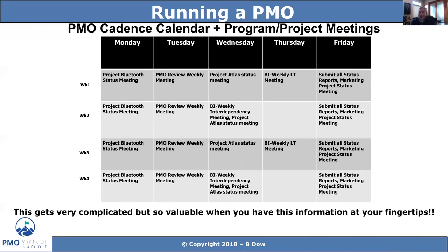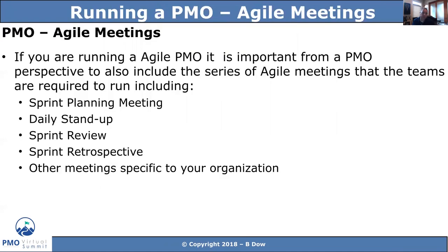Now, it does get complicated. I get that. If you're running 300, 400, 500 projects, I've run some PMOs that have a massive amount of projects, you clearly can't get them all on the calendar. But you can get the top 5, you can get the top 10, you can get the top ones on there to give you that visibility of exactly when the big programs and projects are running and what their cadence is, as well as how it intermixes and how it works with your cadence as well. So really critical to get those two set up and running.